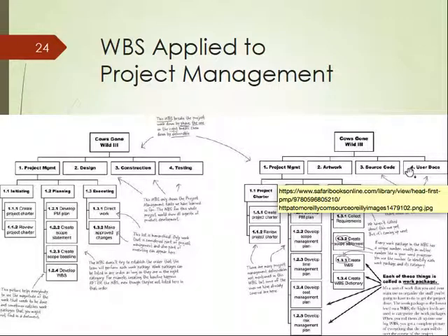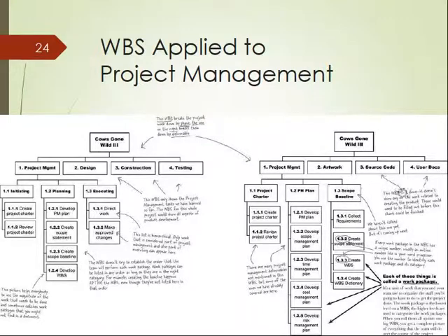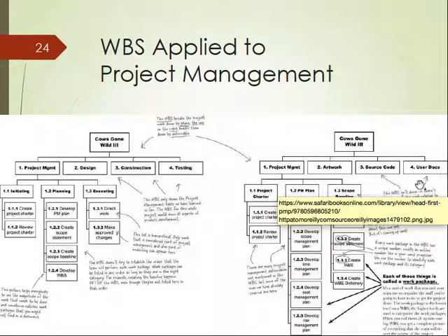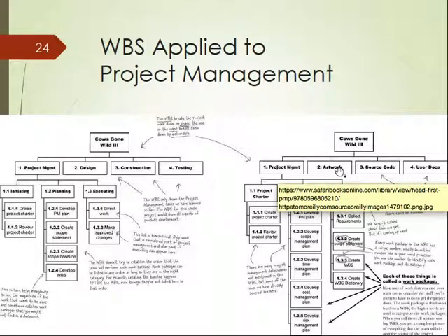So depending on how you divide your project into parts, you can divide by the task, or you can divide by structures, or sometimes you can divide by the time. Let's say earlier time, middle time, later time. So depending on how you divide it, even for work products, occasionally there may be minor differences, but it depends on how you divide things. You may have different breakdown structures.